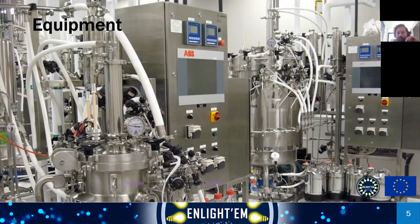If you are not procuring your equipment, then that equipment is already existing in a lab somewhere in your institution. And more likely than not, that's equipment that you would generally share with your colleagues or with other teams. Something I see sometimes not being accounted for in project planning and in research project management is that essentially that equipment is not always available to you, and you cannot just walk in and perform your experiments or make use of that equipment.